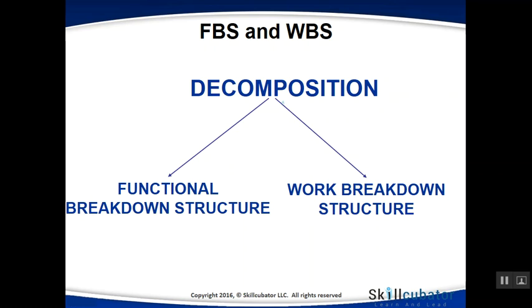Again, for FBS, let's take an example that we are building a new application. You start with an application, go down to different modules, sub-modules, features, and then system level requirements. That's FBS. Whereas WBS is more concerned with the project scope, the activities we are going to do in order to build that product, whether it's an application, system, software, gadget, or a service. At a WBS level, we are more concerned with the project, the activities we are going to do in that project, the work packages, and then the deliverables which will be delivered to the client in order to complete the project successfully. That's WBS.